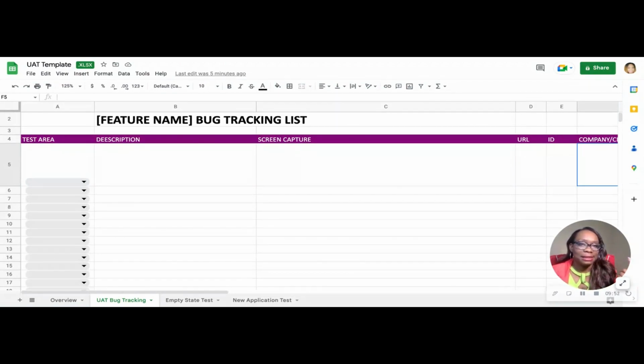So you'll be facilitating this testing exercise by having them join a virtual meeting if it's a virtual situation, or if you can bring them physically into one place, then you bring them into that place, and that's the space that you're going to be testing in. And as they find a bug, they raise their hand and explain what's going on, and you can confirm to them yes, it's a bug, or no, it's not a bug.